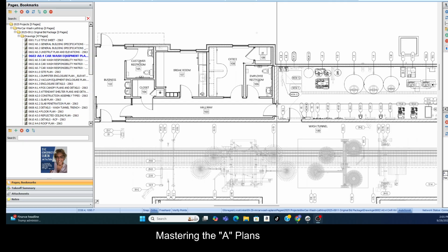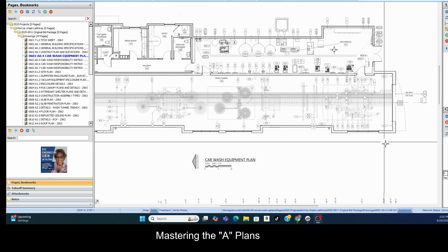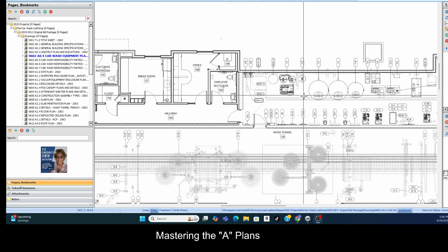Okay, if I'm the framer and I want to know, okay, I got to frame this building. Well, yeah, the plan view is the view that you need to measure how many linear feet of wall you need to measure. Perfect. But what you don't get from a plan view is the height. Now, if you reviewed the title sheet video, it said the height of the building is 32 feet. That means nothing in terms of framing. So there's got to be another view I look at as the plumber to say, what's the height of these walls? But there is another view, and we'll see that later.